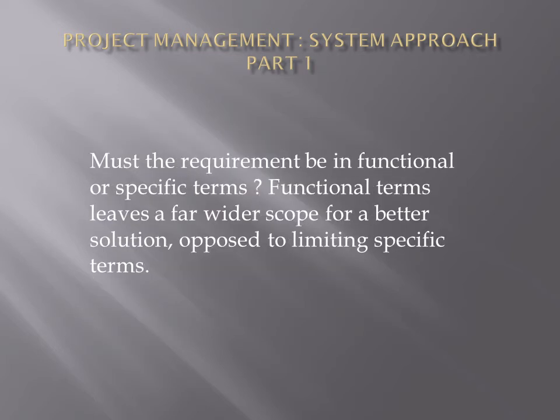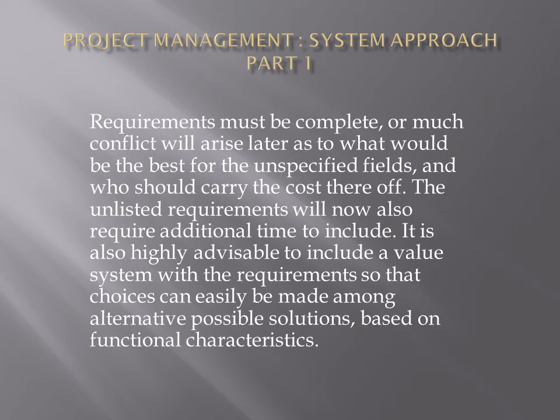Must the requirement be in functional or specific terms? Functional terms leaves a far wider scope for a better solution, as opposed to limiting specific terms. Requirements must be complete, or much conflict will arise later as to what would be the best for the unspecified fields, and who should carry the cost thereof. The unlisted requirements will now also require additional time to include.